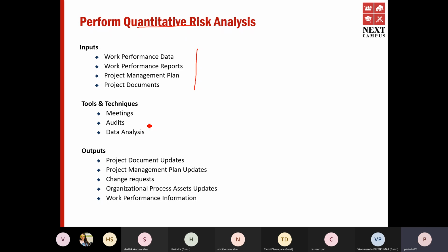So we realized the cost and the timeline. Since it was a mistake from us, because we go as an implementation partner, we go as a trusted advisor, it was a mistake from mine. We agreed that we would absorb the cost in terms of resources, but the timeline the customer would still have to agree.